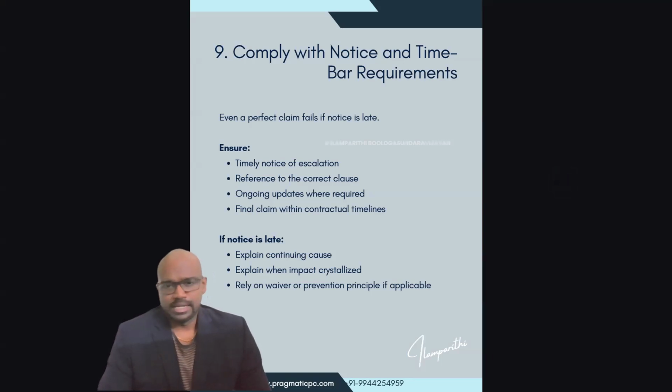Comply with notices and time bar. This is very, very important, as I already said. Ensure timely notice of escalation, refer to the correct clauses, and give ongoing updates where required. You have to keep them informed always, be in communication with the employer, and the final claim must be submitted within the contractual timelines.